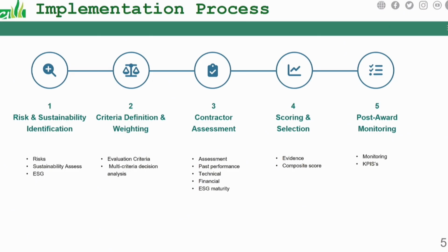And this is more evidence-based. If a contractor says that his balance sheet is okay, it's only fair that he shows that in the documentation that he brings. If a contractor is saying that he has certain ISO certifications, it's only good that he brings those certifications as part of the tender document. That's where you do the assessment for selection. And then finally, you do post-award monitoring. It doesn't end there.